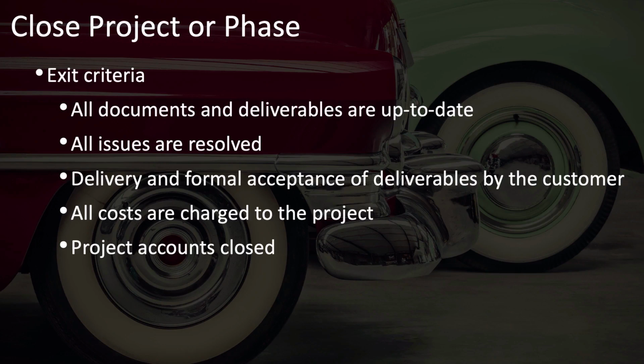You should make sure that all costs have been charged to the project. This may cause a little bit of a delay in closing the project officially, as these charges come through your system and are reviewed and accepted by you. At which point you should close all of your project accounts to make sure that no new charges hit or are assigned to your project.